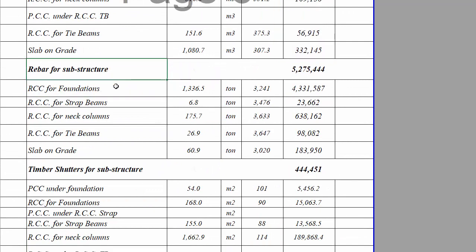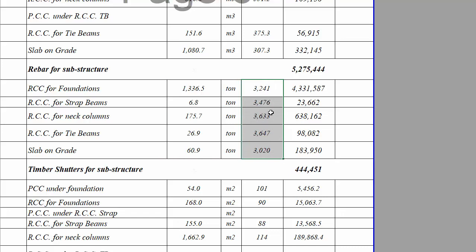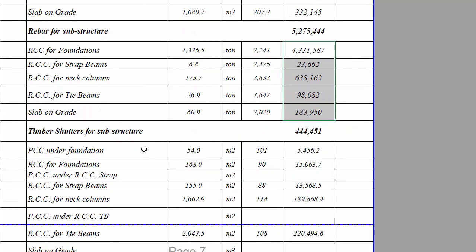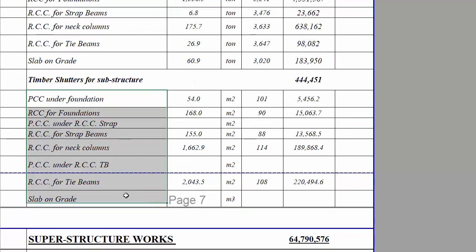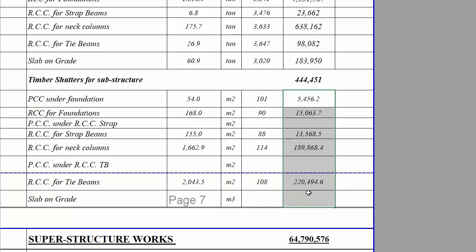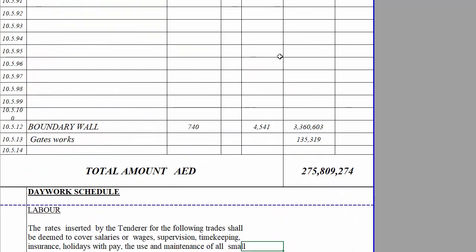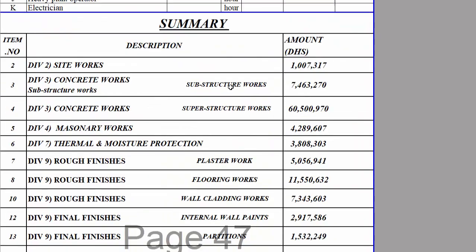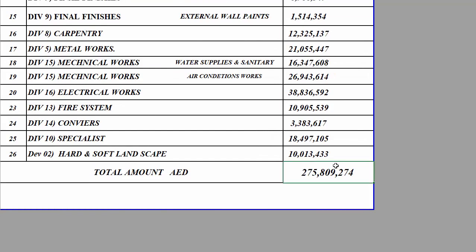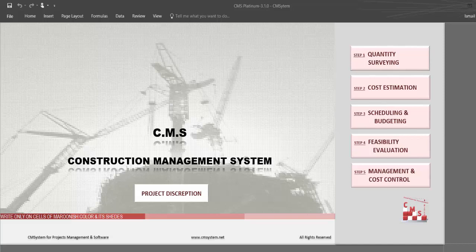For rebar, CMS shows the total quantity per ton for each element, the cost of rebar covering material and manpower, and the final price. The same for shutters — CMS calculates the required shutter area for each element, the rate, and the final price. This is done for all construction activities automatically. Finally, you have the final price in the BOQ with detail and summary for each division with the full price — full quantity surveying, full material takeoff, full project price, and detailed BOQ all as automatic output.